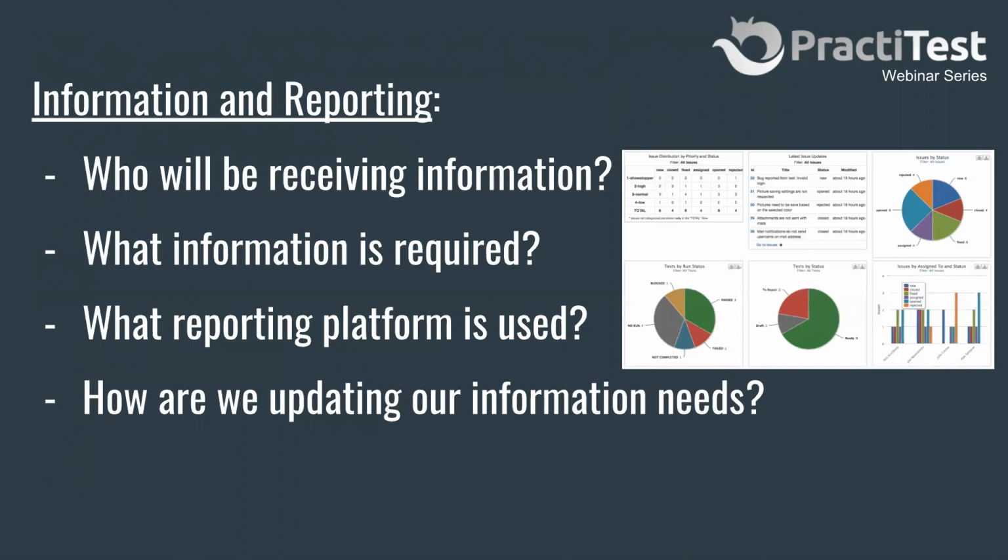So if we're talking about a sales team, the information that they need to get is if the product is going to be going out on time. If we're talking about a support team, the information they require is whether the issues that they promise their customers are going to be fixed. If you're talking about the product team, it's, okay, wait a second, do we need to compromise on features? And maybe the technical team and development team asks, where do we have unforeseen issues that we need to start tackling right now in order to meet our schedule? So each different stakeholder in the organization will need different information depending on the decisions they need to make. So who needs your information and what is the information they require?